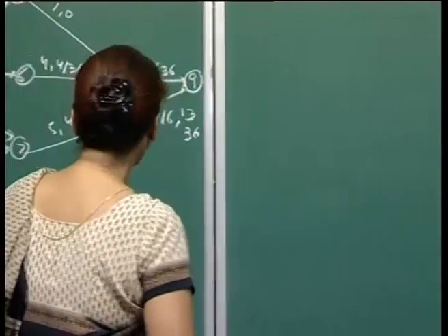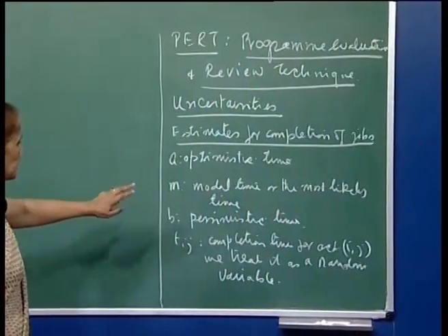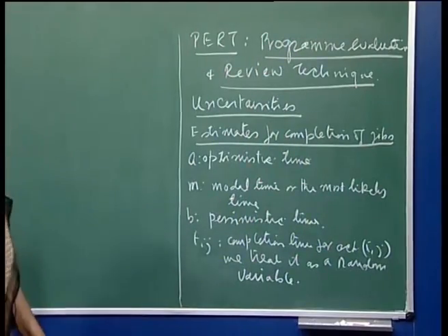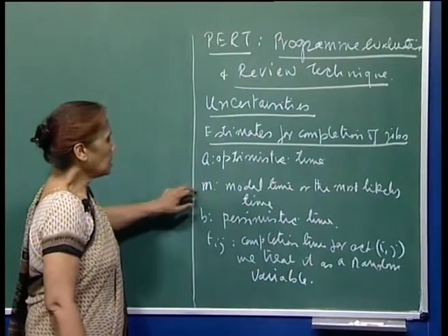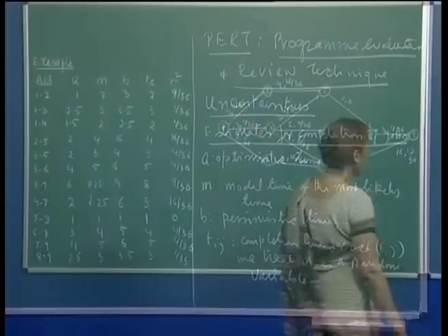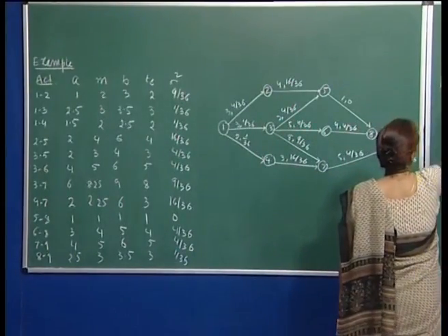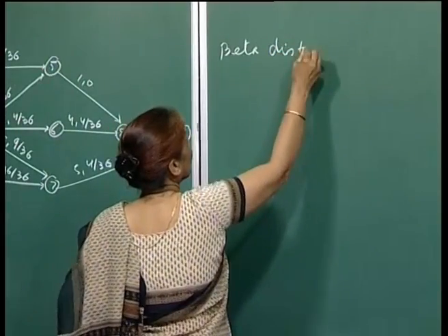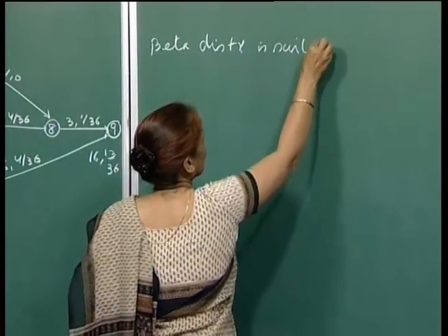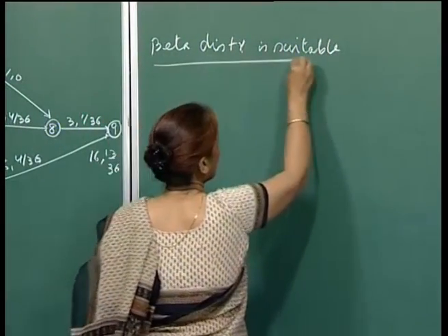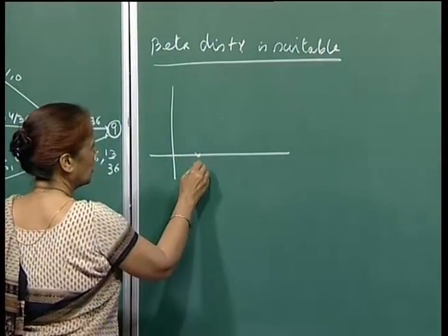So, let us continue with the problem. Here I was describing that we need a probability density function to describe the random variable Tij, which is finite in range and unimodal and continuous and asymmetric. The beta distribution is suitable for this situation, right.